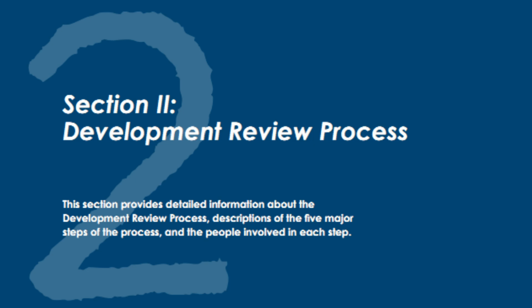Steps of the development review process. Pre-application. Meeting and review, optional. Understand what your project needs. This is where a project begins. Plan review and processing. All application materials submitted and city staff reviews. Noticing and decision-making. City staff approves, conditionally approves, or denies an application. Permitting. With planning permits approved, the building permitting process can begin. Construction. With all approved permits, construction phase begins.